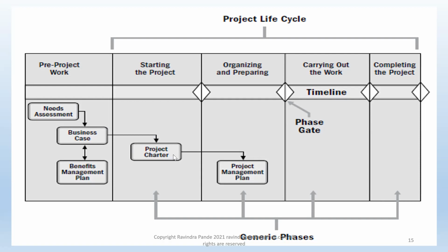But the important documents, as agility believes in reducing the amount of documentation, are that we normally have at least a contractual obligation in terms of a statement of work, SOW, or a project charter to be referred to by the project management team. Based on the project charter, we build a project management plan where we create the tasks and activities to be planned day to day, and the number of resources associated with each work item.